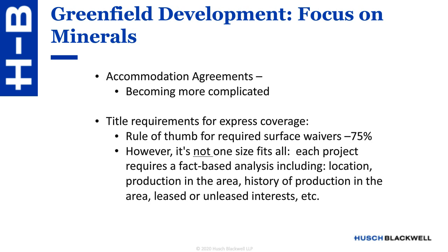From the developer perspective, of course, you want to work with someone who's a little less conservative and may be willing to listen to your case on why in a particular situation you really only need 50% surface waivers or something like that. And as a last resort, you also might need to bring in lawyers who would write a mineral opinion. That could also be required.